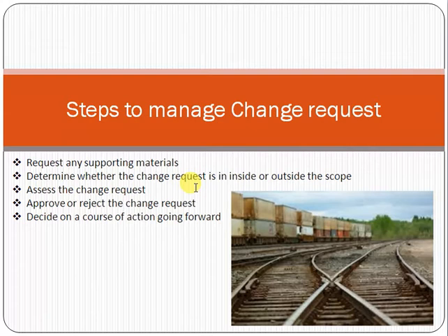If the change you receive is already under the scope, then you cannot call it a change request; it is part of the scope and you have to deliver it. If it is not inside the scope of work, then it is a change request and it will require additional effort.